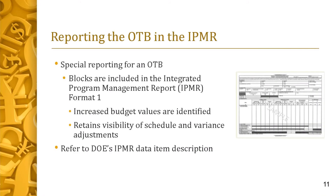Special reporting is required for an OTB project via the Contract Performance Report or Integrated Program Management Report, whichever is on contract. Format 1 is used to reconcile the increased budget values to the CBB or PBB. Any pertinent details on the reporting of the OTB will be included in Format 5. As discussed previously in Step 6 of the OTB process, there are several ways to adjust the variances. Although the variances may have been reset in the OTB process, visibility of the variance adjustments is retained in the IPMR. If the contractor uses a portion of the additional budget to adjust or eliminate variances applicable to completed work, the adjustments made to the cost and schedule variances are also known in Format 1. For more information on reporting an OTB, refer to DOE's Data Item Description for the IPMR.